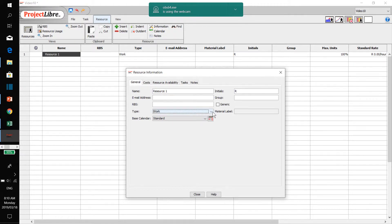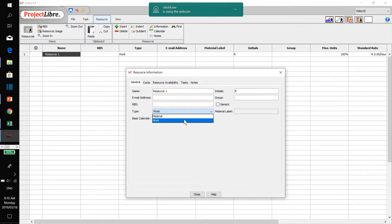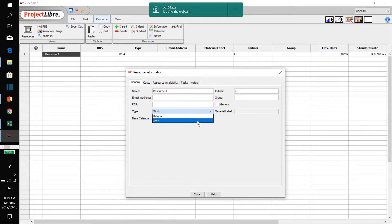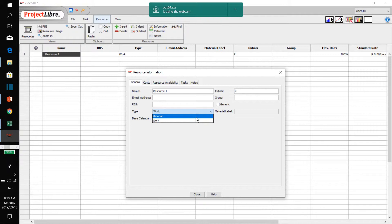You get a material resource and a work resource. The default is a work resource, and you only get these two resources. This is sometimes confusing for someone coming from finance management, where you get three types of resources: material, equipment, and labor.